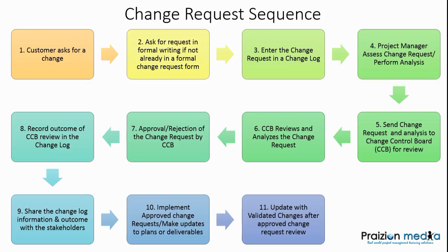And if you get a verified deliverable out on, let's say, the second go round, then you should have validated changes updated in your change log. So validated changes are documented proof that that approved change request is now inherent in the deliverable. Okay, so I hope that helps you with the overall framework for the change request sequence. Take a look at it, get it down, understand it, know the logic and all the associated inputs and outputs that you see along with these steps.